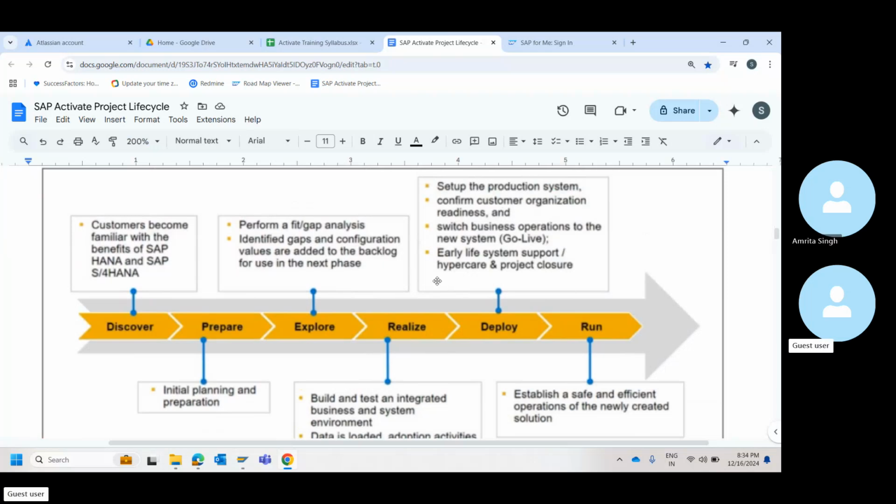That's all. Hypercare, you can term that as an ICU, intensive emergency care unit. So hypercare means, if you are part of AMS, you will be given attention. But if you are still in the hypercare phase, it means that you will need to have a doctor right next to you. AMS is the general ward. Your hypercare is something like an ICU, if you can relate. That means if it is in hypercare, then there should be a consultant 24 by 7 who can support.